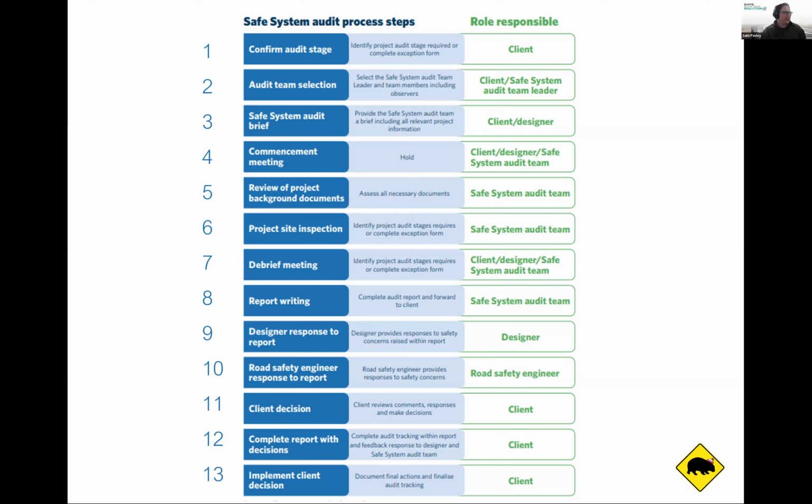Sure. So I think what you're talking about is the level crossing safety impact assessment. Interesting question, because these are two, there's a slight little overlap, but really they're two different things completely. From a few years ago now, KiwiRail had a coroner's recommendation that came through that said they weren't really risk rating their level crossings appropriately. Traditionally, they'd use just ALCAM surveys, which is the Australian level crossing assessment methodology, which is a good way of doing it. But what they've now done, in the last few years, is put on an extra layer. It's called the level crossing safety impact assessment.